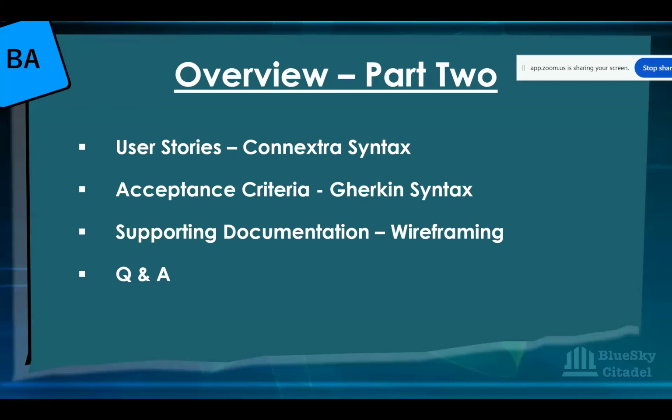I undersold it. It's almost like you're showing someone half of the story. It's correct, but you didn't finish everything. So let me give you a bit more of what the user story does. A user story is made up of, especially when you're using the agile methodology and the project delivery method that we use, which is Azure DevOps, three main parts. You have the description, which is as a, I want, so that. Then you have the acceptance criteria. What's the acceptance criteria?